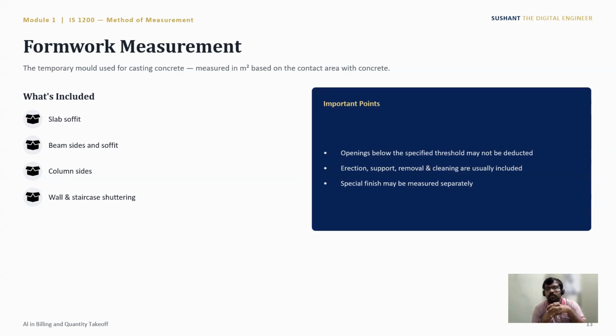Openings below a specified threshold may not be deducted. Then erection, support, removal, and cleaning are usually included, and special finish may be measured separately.